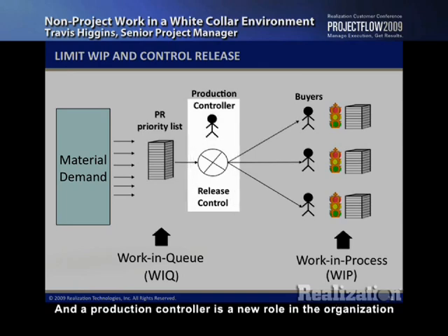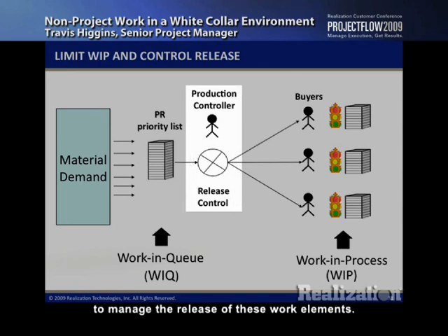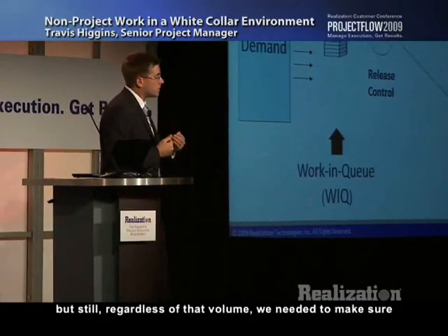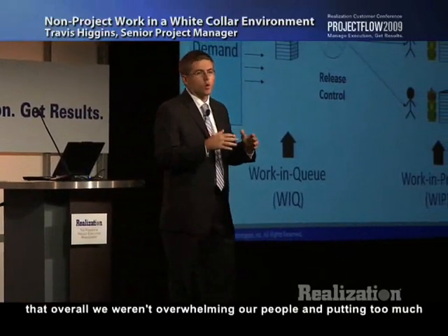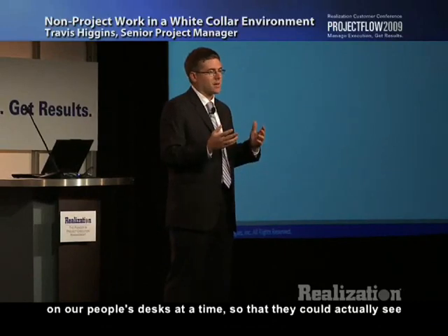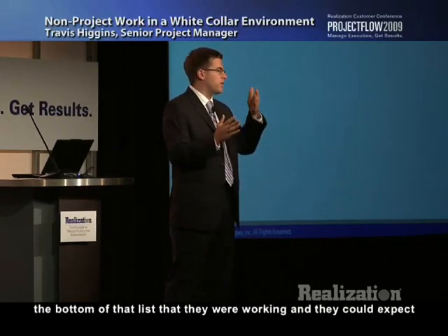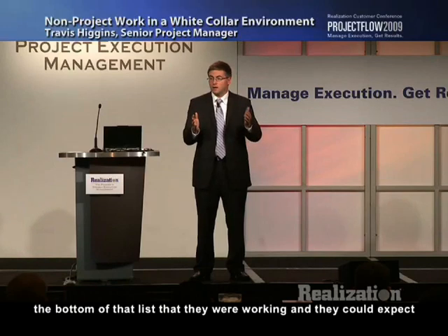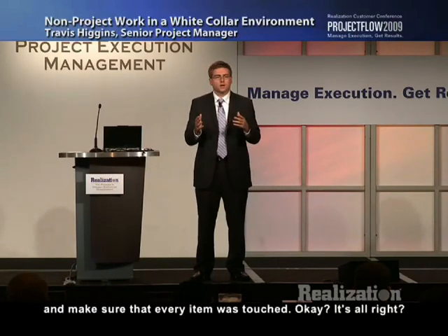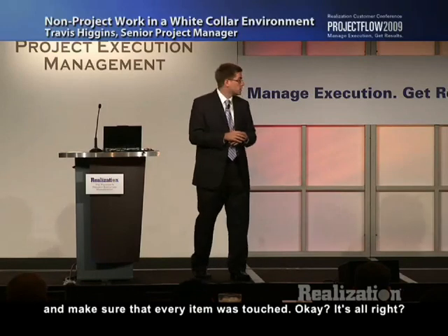And a production controller is a new role in the organization to manage the release of these work elements. Again, we're talking about hundreds and thousands of PRs, but still, regardless of that volume, we needed to make sure that overall we weren't overwhelming our people and putting too much on our people's desks at a time, so that they could actually see the bottom of that list that they were working, and they could expect to get through that list in a reasonable time frame, like a week, and make sure that every item was touched.